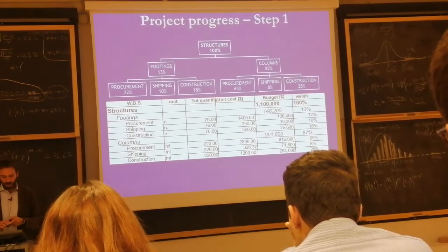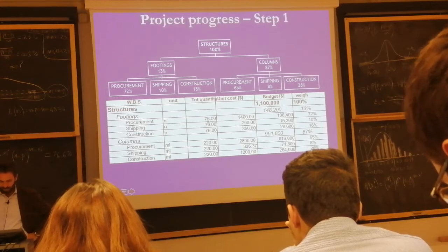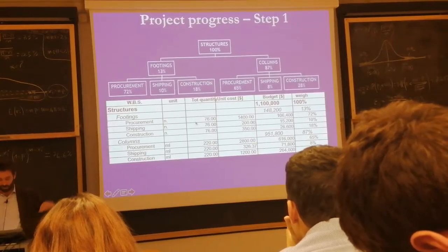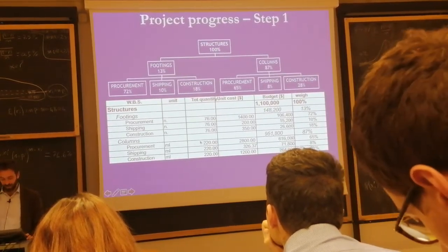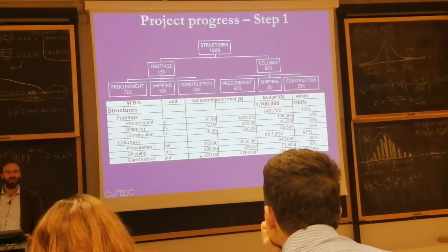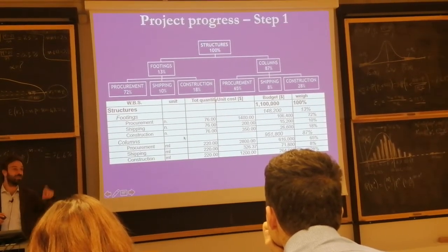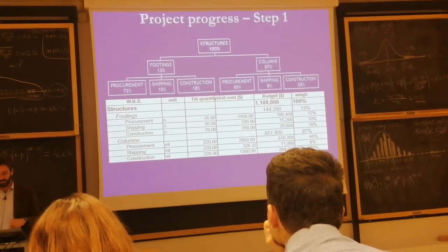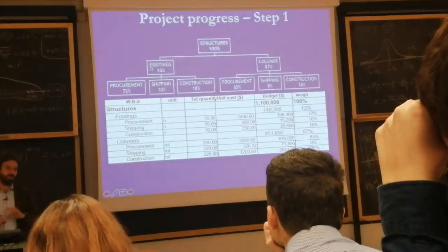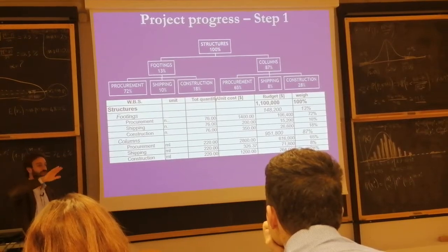So here, the cost breakdown structure specifies that we have to build 66 units of footings, so it's a large one. And on top, we need to build 220 linear meters of columns, which is not one column as high as the Mole Antonelliana or Tour Eiffel, but it's probably 76 columns as high as 3 meters each, which is a one-story building. Make sense? So far so good?